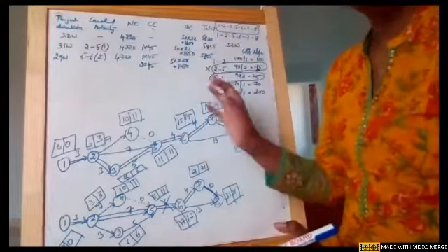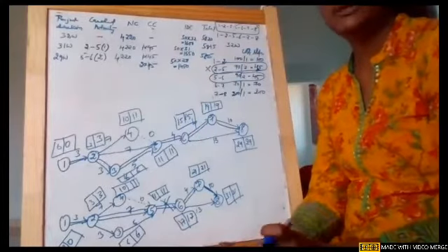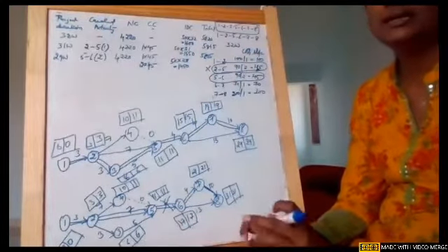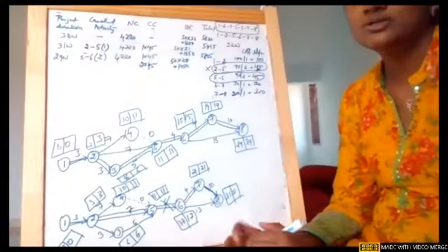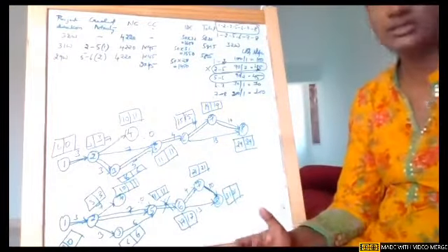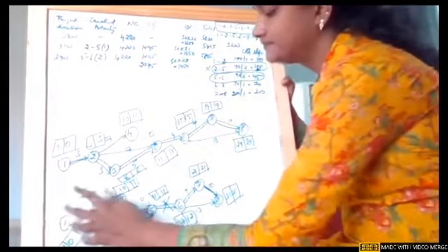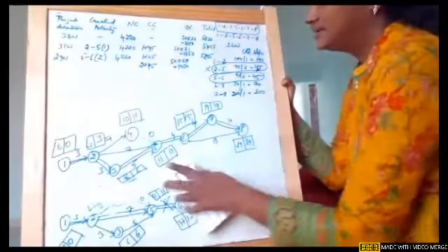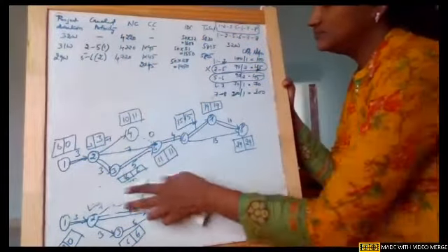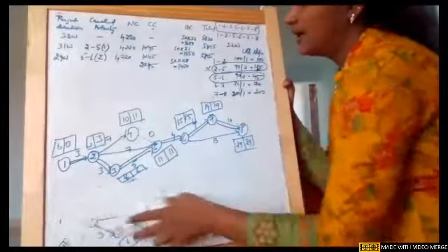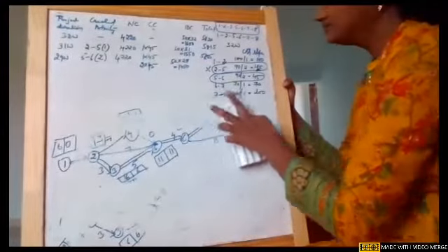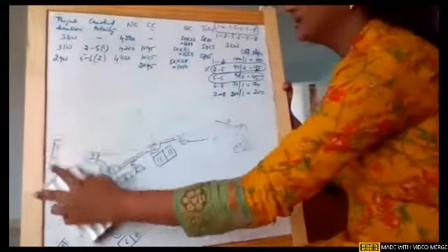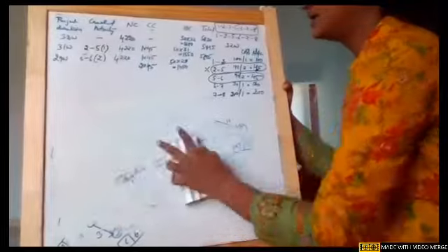Okay, so we reduced it by 10 more rupees. 5,805 is the new cost. So it is reduced. So we need to further continue with crashing. We need to further continue, and I'll just calculate 2 to 3 and 3 to 5 cost slope also, we need to calculate.